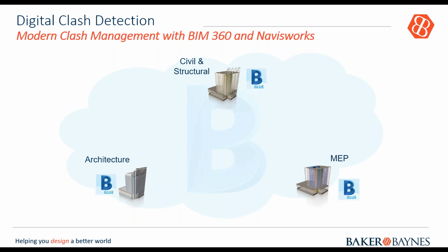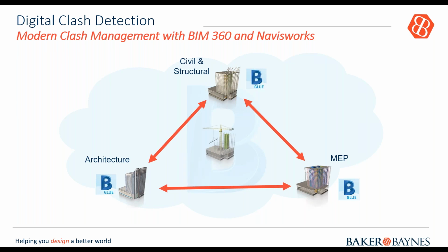We're going to take these disciplines, and we want to be able to do our coordination and management in our own offices, but also link back to each other's files in a very BIM-forward, management-forward way, with the various tools that we have like BIM 360 and Navisworks. Using these tools, we can try to figure out our clashes before our meetings and then come to our meetings well prepared, and not waste any time on the minor things that we can sort out by ourselves in our own offices.